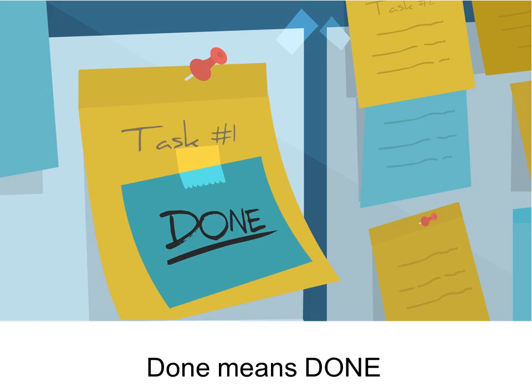Now the concept of "done means done" is very important to understand. Even though we are going to do it bit by bit, it's always important to realize that when you deliver an output, it's not just a part that would be further tested down the line and so forth, but something you are producing for the users to possibly start using after you are done. Meaning it should be complete and stand alone on its own and produce the desired business value it's supposed to, without the other parts that have not yet been developed. So it's important while writing the user story, while building it, and while delivering it, to keep in mind it's an increment that can be utilized, can be shipped to the users as soon as possible.